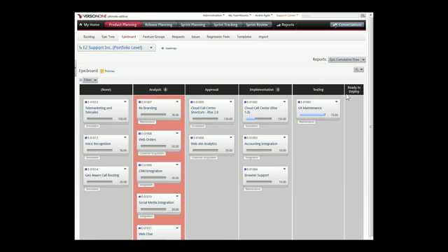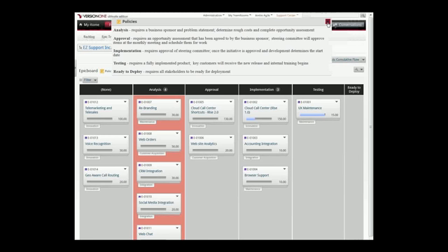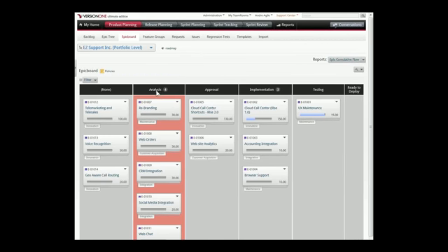So this workflow here is something that gets defined by the organization, so it is flexible. You can add whatever statuses and whatever buffers you may have in your workflow into version 1, so it's really matching your process. You can also identify the policies around when an item should move in or out of a particular state in that workflow. Also, if you're familiar with Kanban, then you'll know that one of the things that it tries to help you do is see when you're putting too much work in process. So there's also WIP limits that can be identified or defined for a particular status.